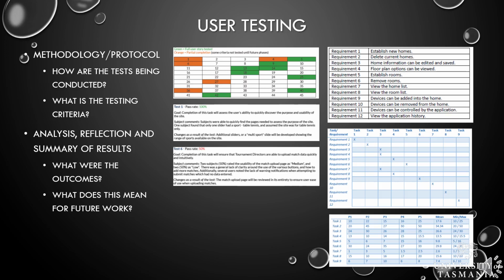What we can see from this first set of columns is that use cases that have been identified previously in the planning report have been brought over into a visual representation. Some of the user stories have already been included in this testing regime in Agile Cycle 1. The green one shows a full user story was actually tested and has met all of its specifications, and the orange indicates that some of the criteria have been tested and passed, and yet other attributes of that use case are still to be tested.